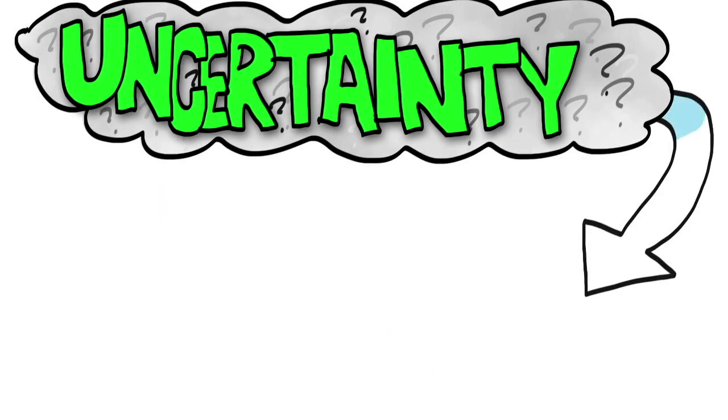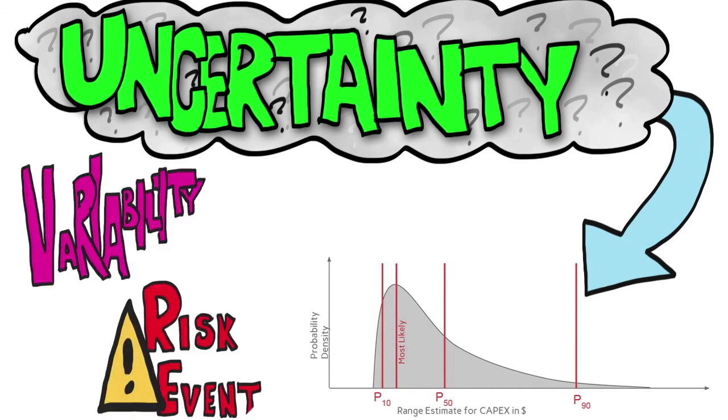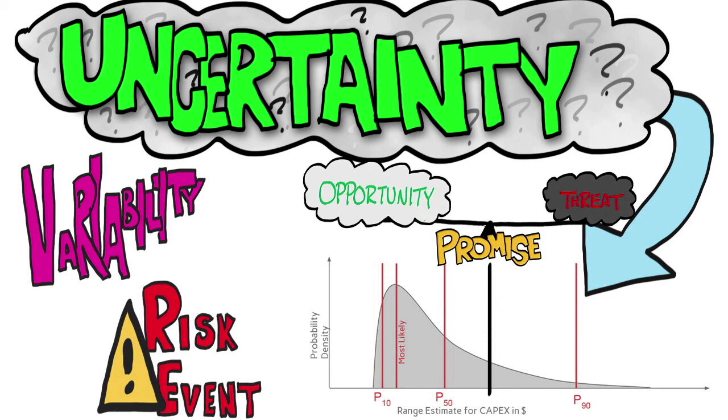We can discuss the uncertainty of an estimate using a range estimate. We can evaluate the sources of the uncertainty, namely variability and risk events. We can even collapse the range estimate by setting a promise that seems to properly balance the opportunity of doing better versus the threat of doing worse.